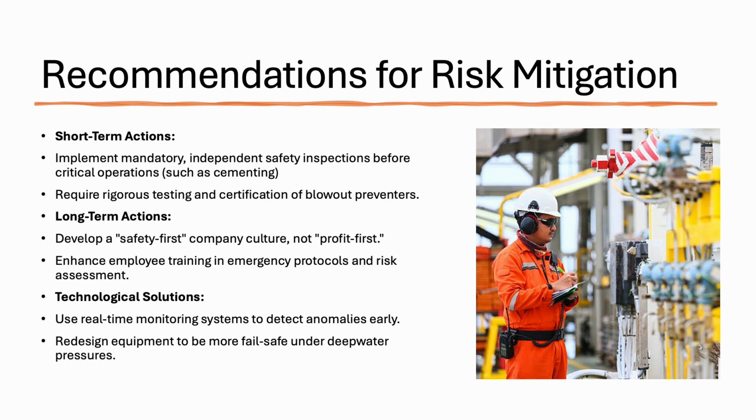Finally, real-time monitoring technologies should have been installed and fully utilized. Advanced sensor systems could have provided earlier warnings of dangerous anomalies, such as abnormal pressure buildups, giving the team more time to respond before a blowout occurred.